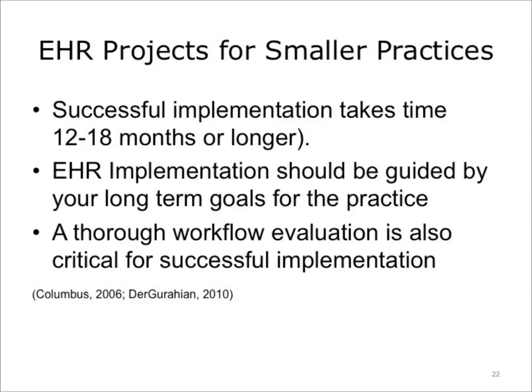Just like large practices, you should take care to include a thorough workflow analysis in your project plan, particularly when it comes to scheduling, triaging, patient registration, referral management, visit documentation, orders, result management, protocols, treatment plans, clinical decision support, co-payment capture, claims processing, and billing. Other areas should be considered as well. Special consideration should also be given in office environments where the transition to an EHR coincides with a transition from a paper tracking system to a paperless tracking system.